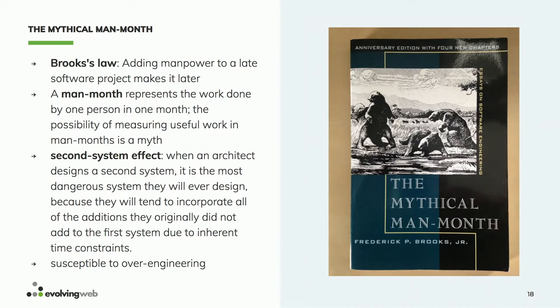It's from the 70s or something, by Fred Brooks, who was leading IBM System/360 development, their operating system. He had like 500, 1,000 developers under his team, and it was a huge monstrous project for one of the major enterprise operating systems. And he formulated what he calls Brooks' Law, which is adding manpower to a late software project will only make it later. And he has charts about people communicating and meetings and number of emails, CCs and BCCs.